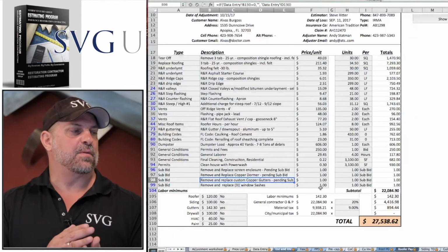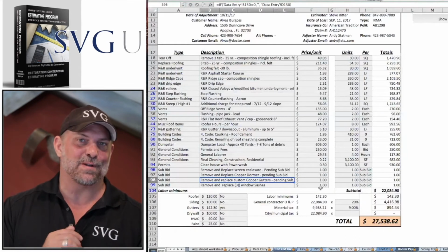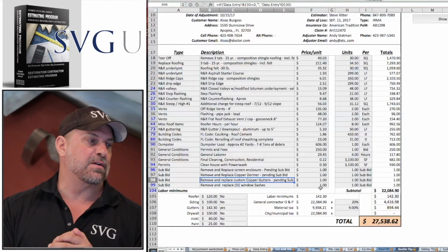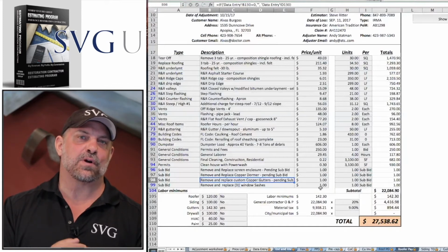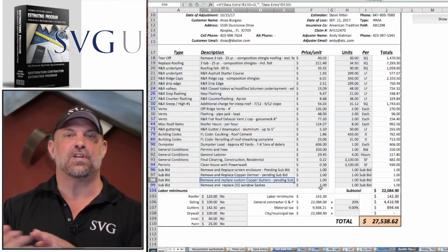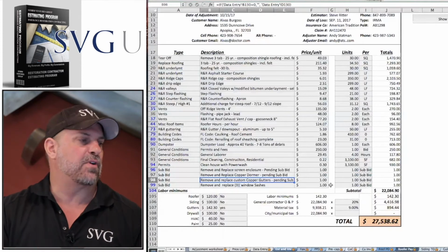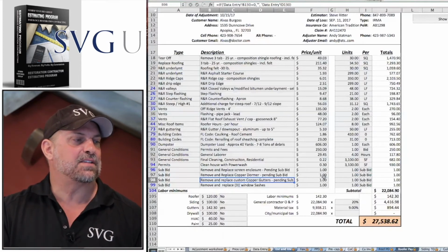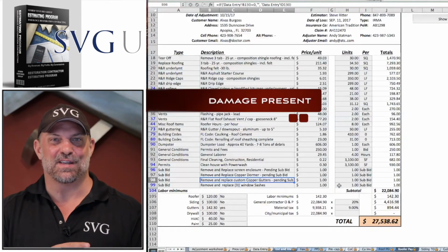Now, in that time, if the property owner says, yeah, Anthony, you're going to do the roof, we really want to get that copper dormer done, we want that new copper, we want those copper gutters, now I'm going to go get my sub bids. And the sub bids for that type of work are probably going to be higher than Xactimate, in which case I'll send these in later as a supplement, probably during the roofing project itself. But what it lets that desk adjuster know is a couple things. One is that there's damage on those areas. Hopefully the field adjuster already wrote them.